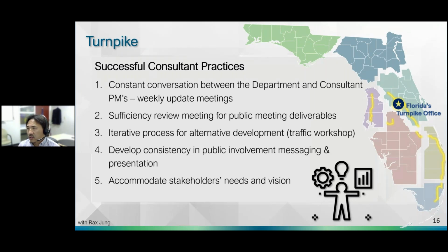So, successful consultant practices. Number one would be consultant communication. We all know that a project cannot be successful if it's not managed effectively. To ensure the project is progressing as planned, regular two-way communication, either weekly or bi-weekly, will be a foundational best practice for successful project management, especially between the department PM and the consultant PM. Having a direct call or video chat with the consultant PM or other project team members will make for faster problem solving and decision making for the project.